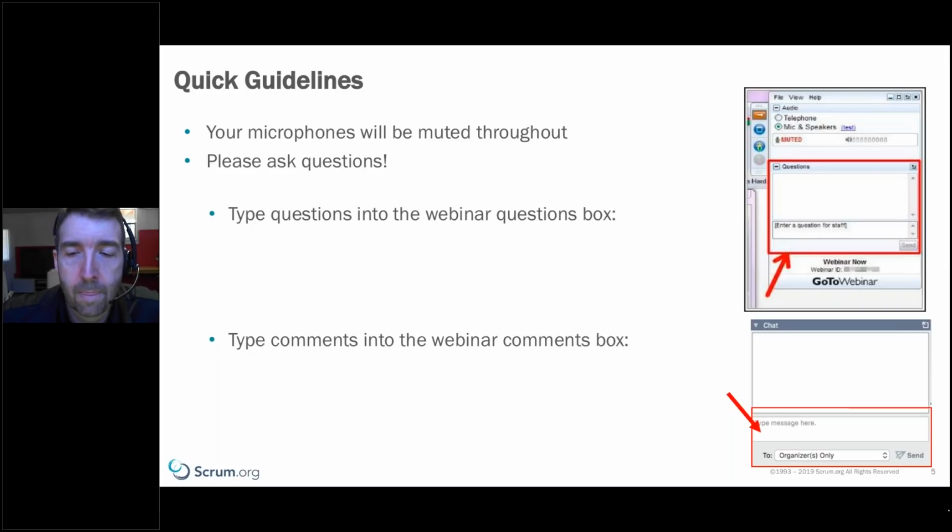So to sum up, whatever is required to make the solution usable by your customers should be in your definition of done. So that would include, ideally, all testing. It includes if the customer can use it without documentation, and documentation is considered a nice to have. In other words, we don't really have to have documentation. If that's the case, then you don't have to have documentation in there. If you consider documentation a requirement and simply a requirement that we'll meet later, then documentation should be in today's definition of done. Great.